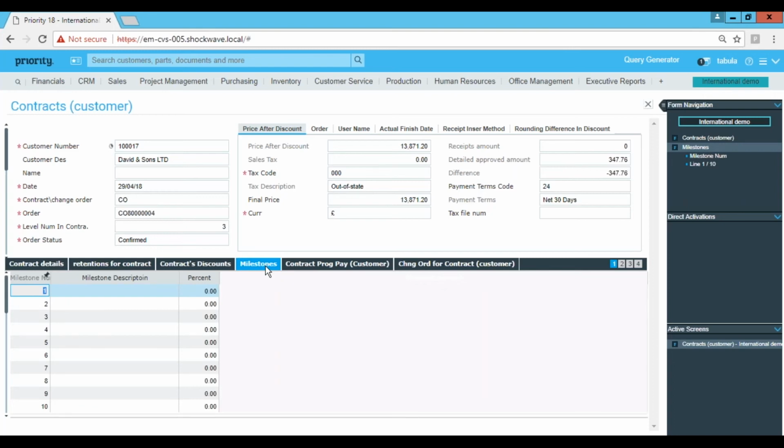Our first application will be 25%, the second one will be 25%, and so on up to 100%. So when you do the application of payment, you can say this is milestone 1, and it will automatically assign 25% performance to all the activity and send an application to your customer to say, we have completed 25% of the contract. Can you pay us this money?